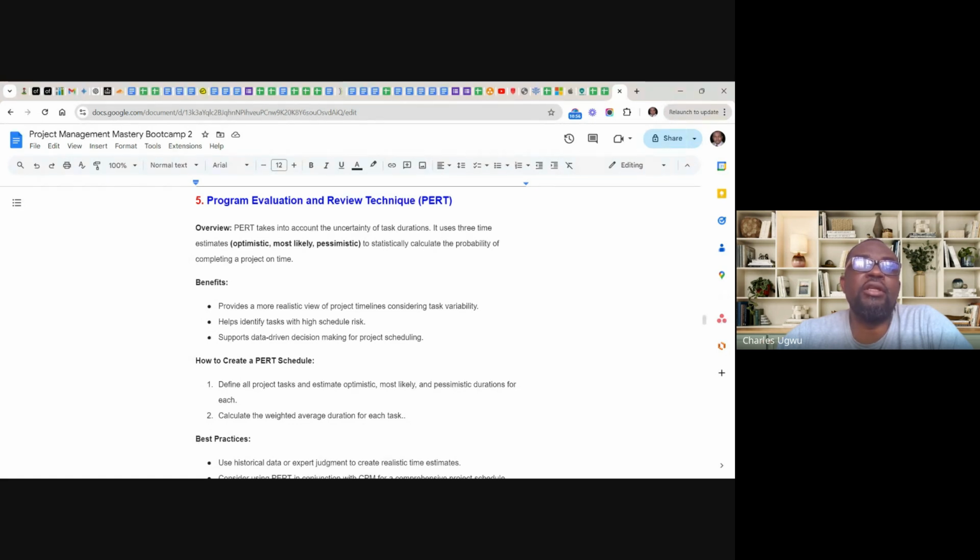Let's say 1 day is optimistic, and then 2 days is most likely, and 3 days is pessimistic. So if we capture these 3 scenarios, these 3 time estimates, you calculate it, and you come out with the average, and that is the way it can be done professionally.